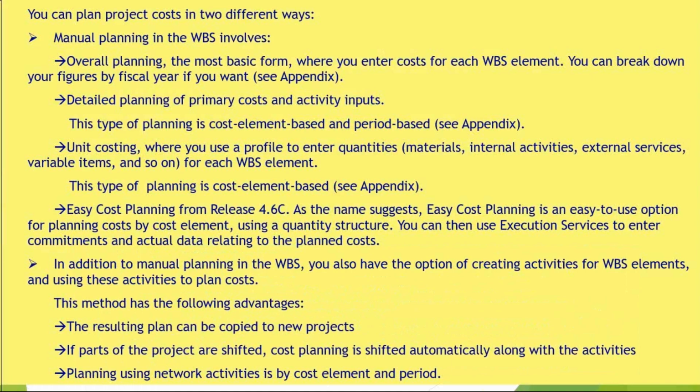Whenever I move my WBS from one level to another level, accordingly the entire structure, the activities below, will also get moved. And simultaneously my time scheduling and planning will get moved. If I am altering my structure, accordingly my plan elements, my time, along with the activities, will follow. If I don't have the activities, I'm going to do my cost planning through cost element planning, so again, whenever you break your structure, you need to do it again. You got it, Prabha? Yep.